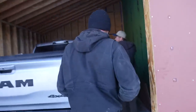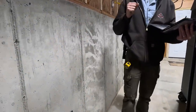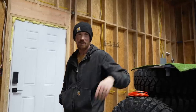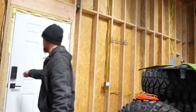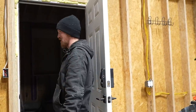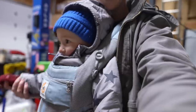Hey, you got that wall over there? Yeah, I did. I'm about to get a little bit for you. Okay, and all your outlets on this level are going to be GFCI protected? I'm going to do GFCI breakers, yeah. Okay. The biggest thing holding me up is that both of these garage additions on either side, it snowed before we could get the foundations poured. So like in this one, I can't install that door until I have a concrete floor to put the door on. And then in this one, I can't put the garage door on. So I'm kind of stuck. Yeah.